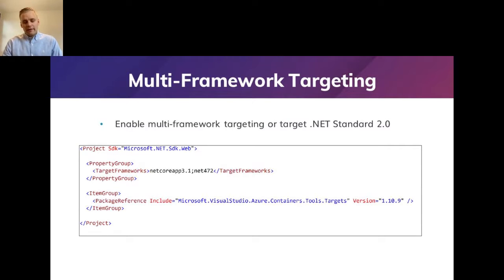The reason behind this is that we wanted to continuously build our production version on .NET 4.7.2 and put that in production every 2 weeks. But we also wanted to have duplicate CI pipelines to build .NET Core 3.1, so we can see how far away from our goal we are and understand what packages are incompatible and what's not working, and so forth.